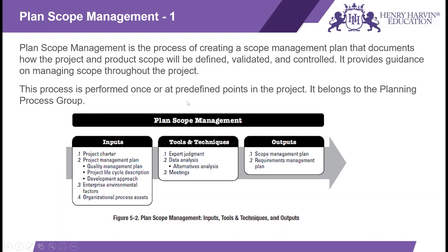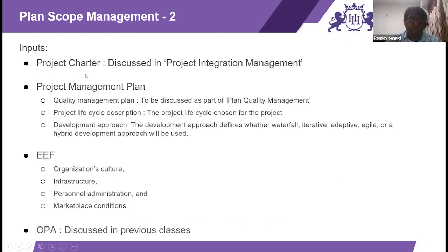Okay, so inputs: project charter. Can anyone tell me from memory what the project charter generally includes? Objective, deliverables, and basically the project sponsor and who is the project manager. Yes. And it includes a very high-level description of the project and a high-level description of the scope of the project also.